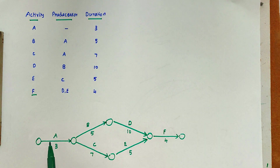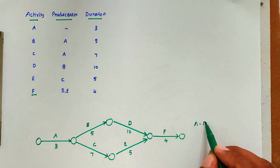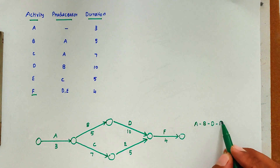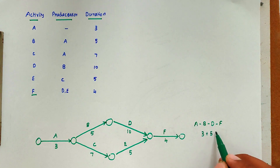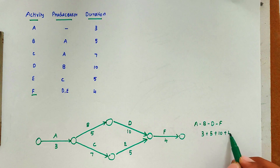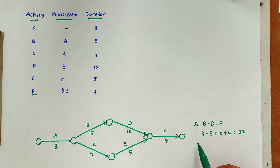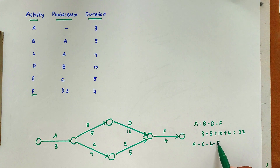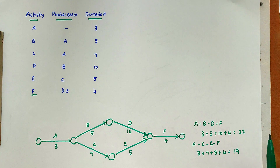Now we can write out the paths. There are two paths. The first path is A–B–D–F with corresponding durations 3 + 5 + 10 + 4, giving a total duration of 20. The second path is A–C–E–F with corresponding durations 3 + 7 + 5 + 4, equal to 19.